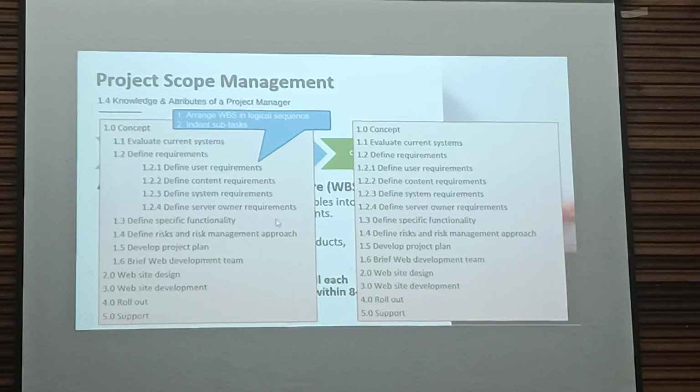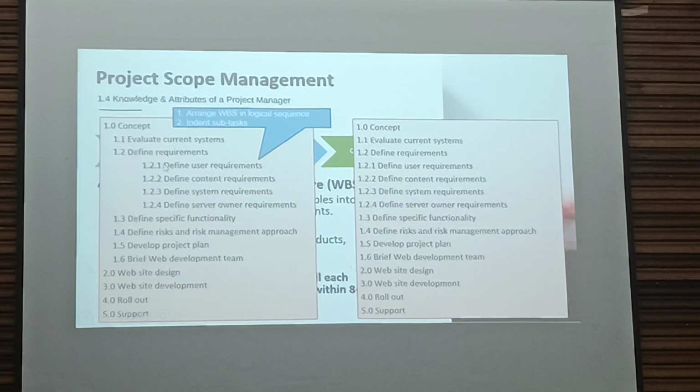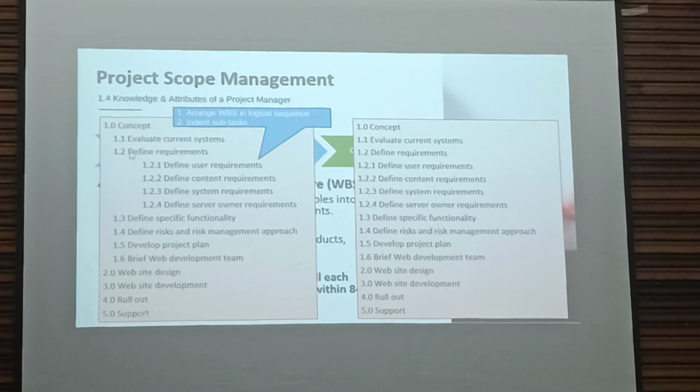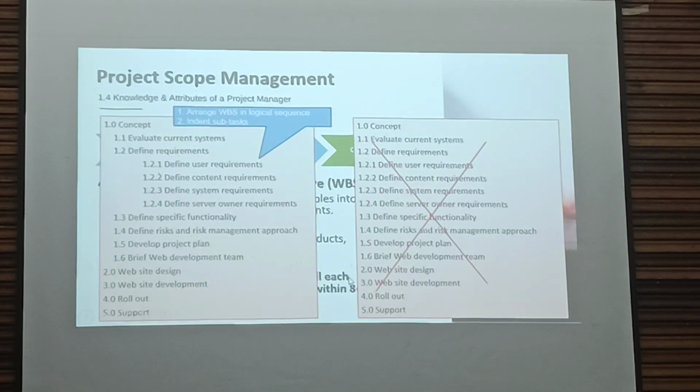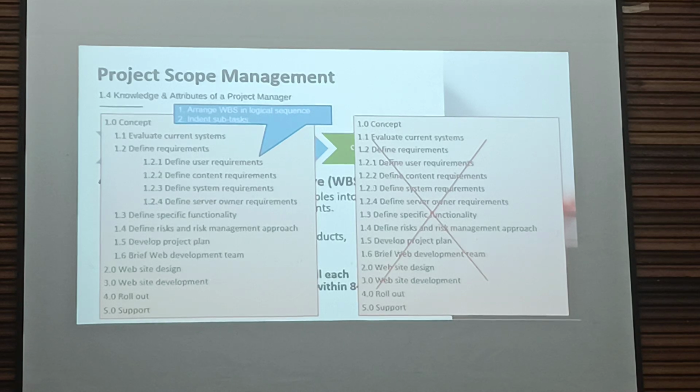Okay, so we have created a work breakdown structure. Arrange the work breakdown structure in logical sequence, and indent subtasks. Indent means this 4 belongs to this one, 1.2. Don't do it like this, because it is hard to see the relationship. It's very difficult to see the relationship.